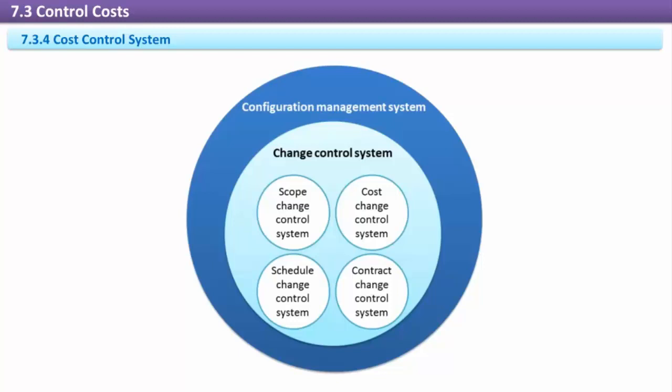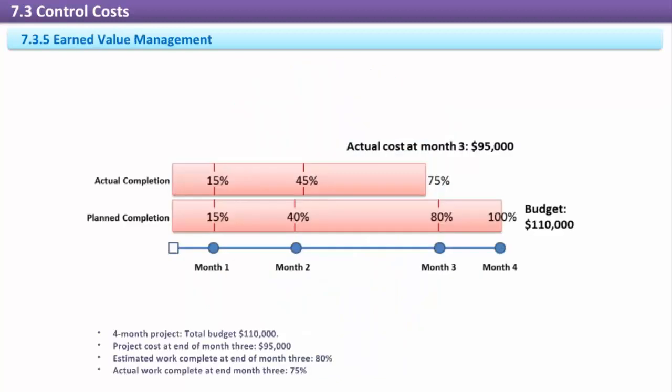One of the project manager's most important cost control functions is to proactively influence the causes of change, and this includes discouraging unnecessary changes that will impact costs. This is not to say that projects should have no changes, but only that unnecessary changes must be deterred. Earned value management. One of the most common cost control techniques is earned value management (EVM).